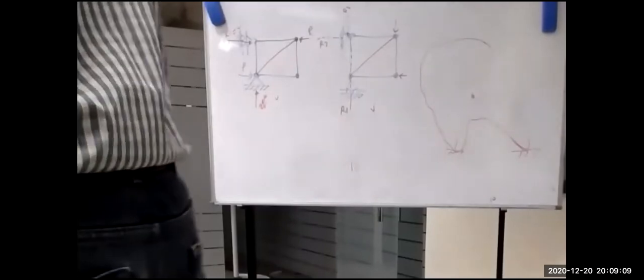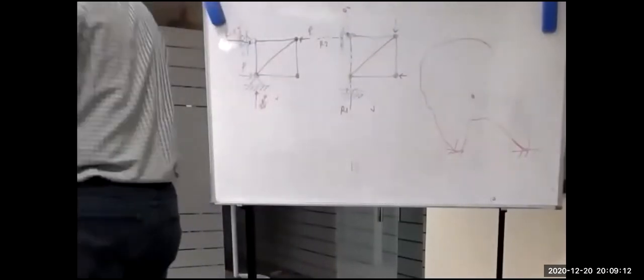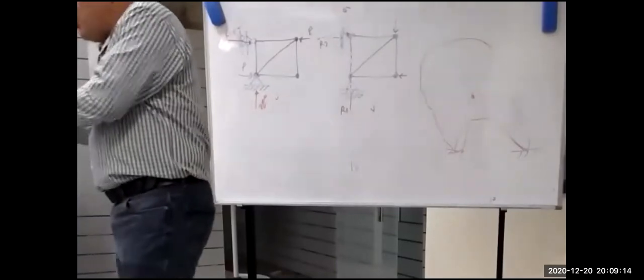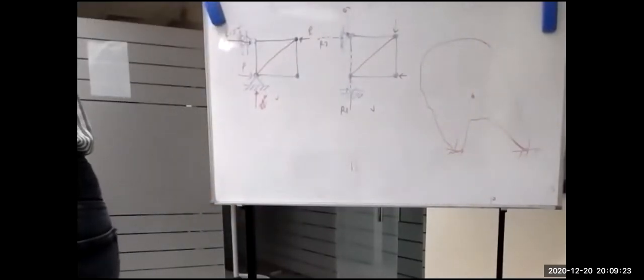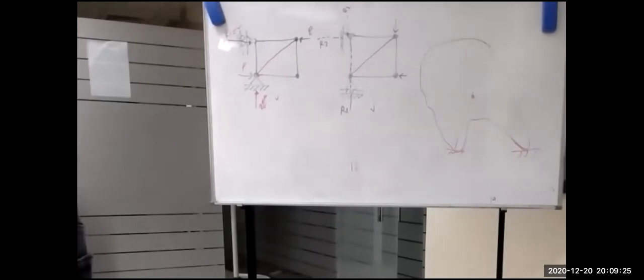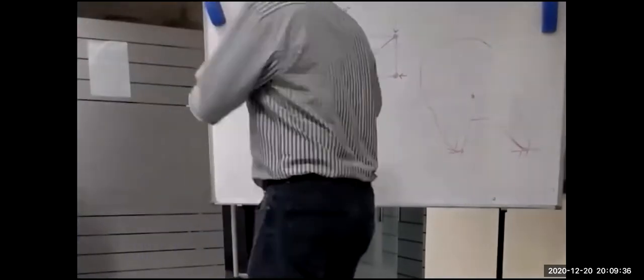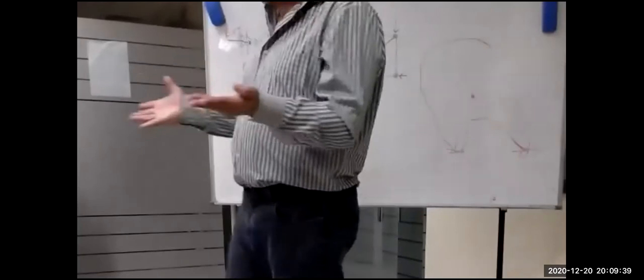Or maybe he is asking for a particular scope change. A scope change on the critical path means you are entitled. You are entitled, and he is telling you it's not. Be careful, not in capital letters. It means LB is correct. Like in design change, we already have design change. Design change could be expanding the area, 14 square meters, so the area of this slab will be 60 square meters. This is extension of time. Then what else?